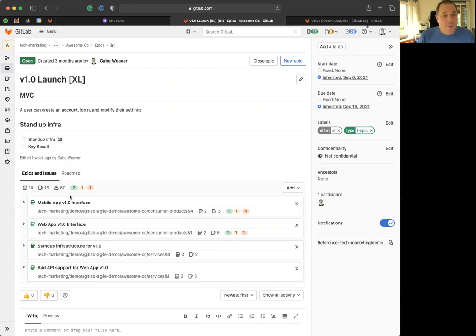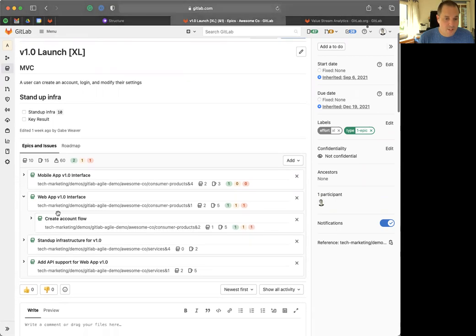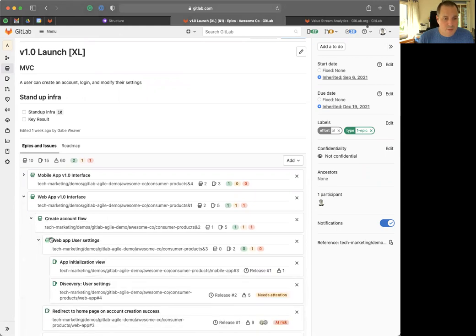For example, I've created this epic here, which is the highest level over here is denoted as an epic. I've created a mobile app interface within the consumer products team, created a web app interface, sub epic, which is a capability within the consumer products group as well. And then we have some infrastructure and some API stuff that the services group needs to deliver. Those can further be decomposed, as we mentioned, down into features. So we need to create the account flow. And within that, we also need to manage some web app user settings.